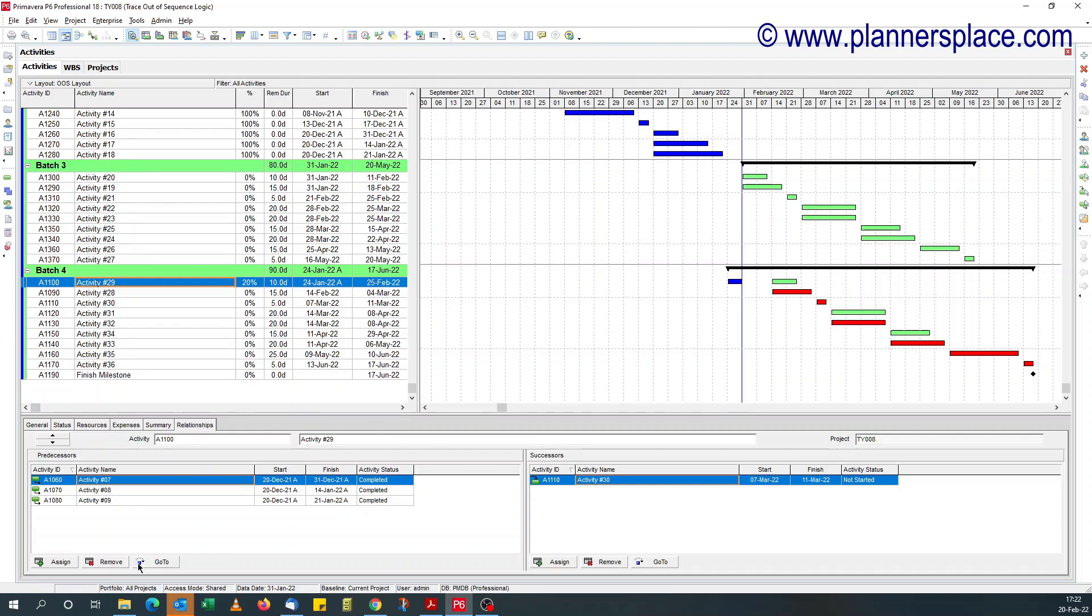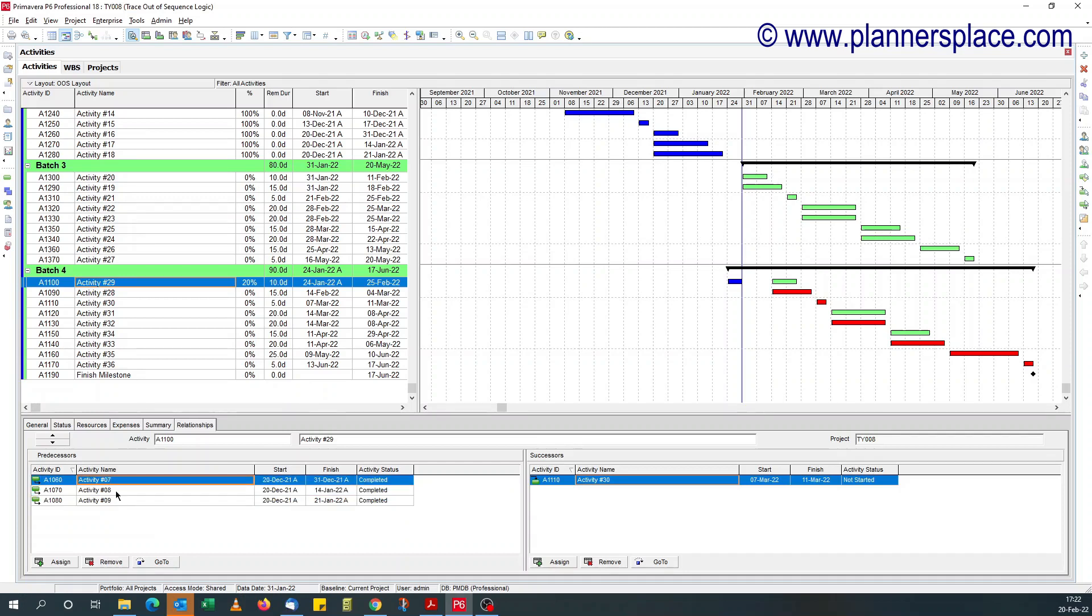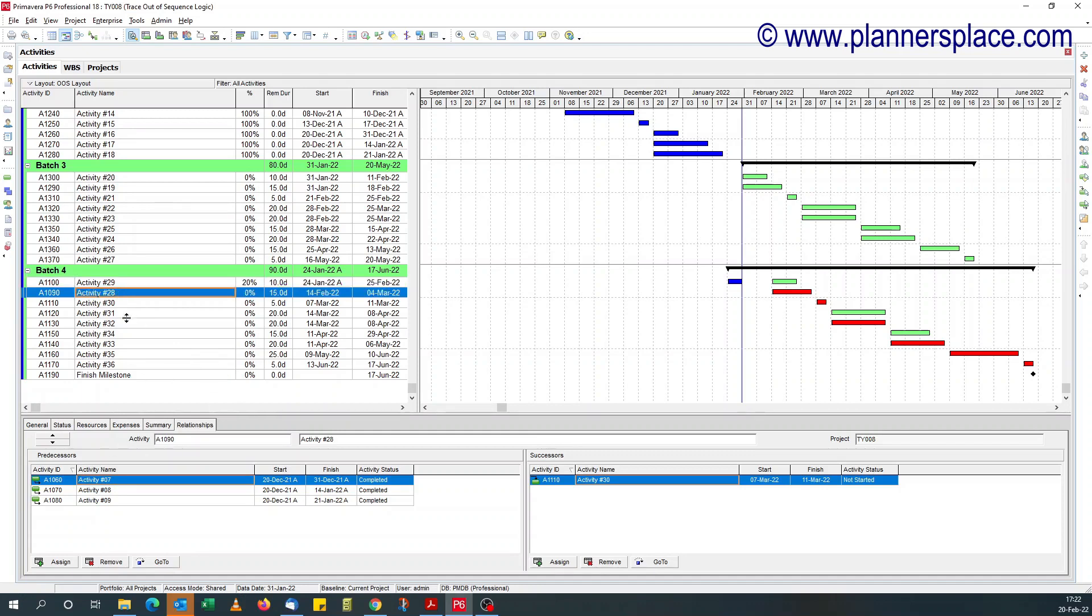What people do is just pick each predecessor and trace, do a go to, follow the go to button and trace the logic. Imagine you have a schedule of a thousand activities, how far back would you go?